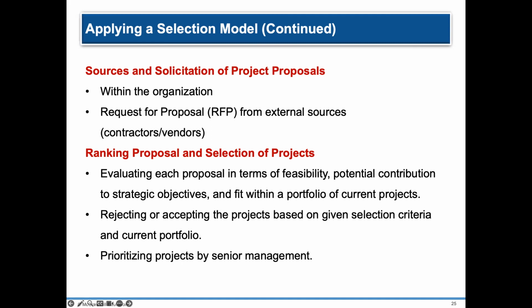Or if you are a third party contractor or vendor, you actually send your proposal to the company for review. And these proposals are reviewed and ranked. Therefore, they are screened and are being evaluated in terms of feasibility, potential contribution to strategic objectives, and fit within a portfolio of current projects.